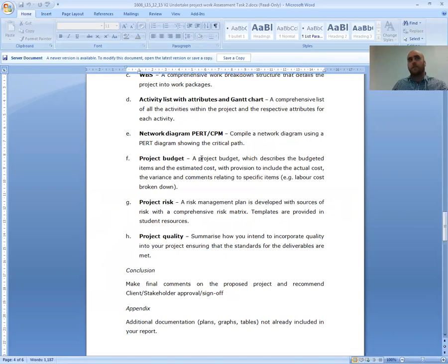Break it all down. What I would suggest then too is next to that, so that's the budgeted figure. Remember what we did in Manage Finances. Have an actual figure. And then again, you're just making this up. You don't really know it yet. Compare the variance, any projected variance, or have you accounted for any strange expenses? Have you got money left over? Are you overshooting your budget already before you've even started? It's a good chance to have a look at it.